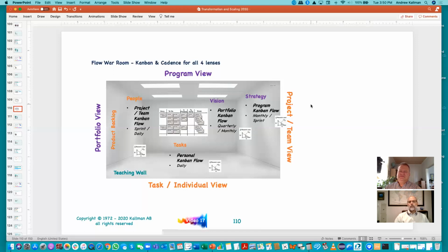And that became very important because one of the things that we identified was that even though the team had consistent velocity, it didn't mean that the velocity or the work being done was efficient. And so through the retrospectives and problem solving, we worked on eliminating rework and waiting time. The dependencies were key in identifying the waiting time, and then the rework came from just the retrospective.